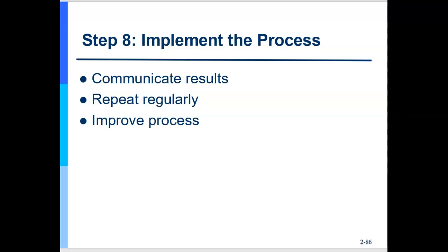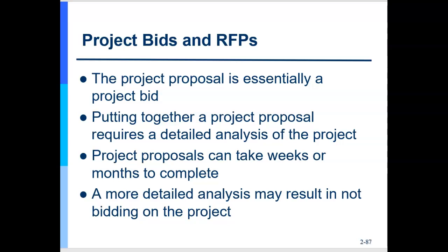Okay? The final thought in the last 2 slides, project bids and requests for proposals, or RFPs. So not everything you do in a project can you build yourself. Not everything is in-house. Sometimes you have to go outside the organization to make sure you get the right resource, people or equipment, or structures, etc., at the right time when you need it to make your project schedule work, right? And so you want to use the bid or RFP process.